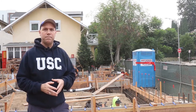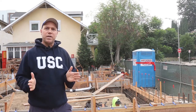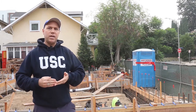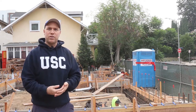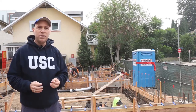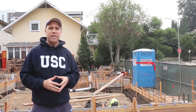They'll give you information. We had an inspector come out, and she told us, hey, this is a commercial project because you're within 10 feet of the building. I said, okay. So because of that, you have to get commercial contractors to do your plumbing, your electrical, I mean, everything. So I priced it all out. I called, I got bids for everything. I was looking at about $400,000 to $500,000. That's a lot of money. It's way over what we had expected to spend.